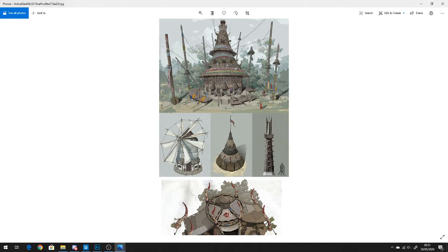what are the risks that you need to face, or the dependencies that you have already written down, and so on and so forth. So you explain that. So in order for me to complete this with texture fully and ported to the game engine, it will take about 4 hours, for example. Agree, done. So the task is yours. You can see?